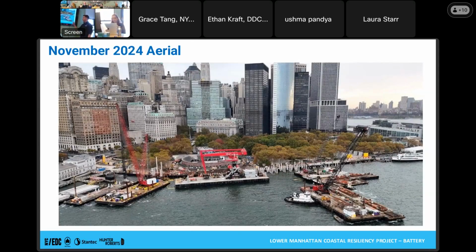We actually had the smaller version of it out this morning, bringing over some more of that expanded channel. Did the tugboats have to stay there? The tugboats don't have to stay there, so there are things called spuds. These go down into the mud line and they hold the barge in position. We typically will have 1 or 2 tugboats out a couple days a week to do these barge moves, because barges can't move on their own. We do have 1 tug on site, called a pusher, a much smaller tugboat that can slightly alter location, but to move across the job site, you need a tugboat.